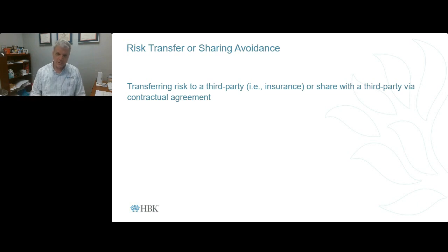Next one is probably more common, which is the transfer of risk or sharing of the risk. The best example I can give is either you're going to contract with a third party to accept some of that risk, and maybe you've outsourced your IT function to an MSP or managed service provider, so they're going to take a lot of your risk off, or maybe you get an insurance policy.